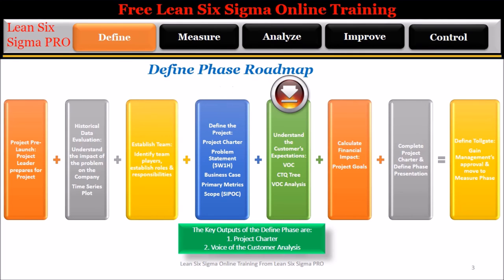Step 5: Understand the customer's expectations through a series of interviews. This is called the voice of the customer, or VOC. From the voice of the customer, the team will create the critical to quality tree and voice of the customer analysis. The voice of the customer analysis is a key output of this phase and will be used in the measure phase to create the data collection plan.